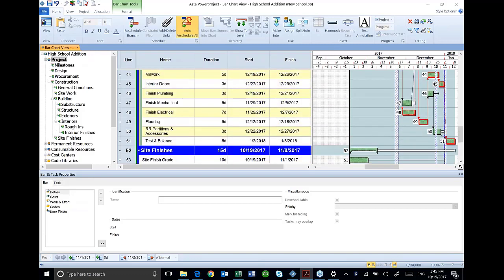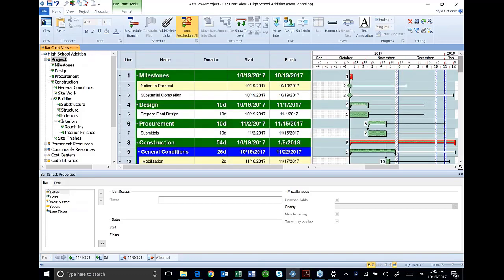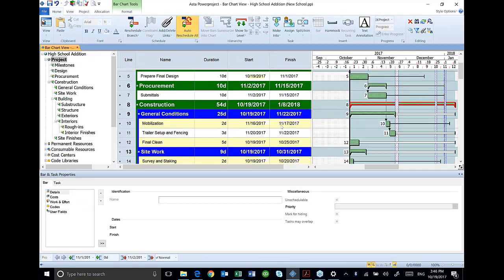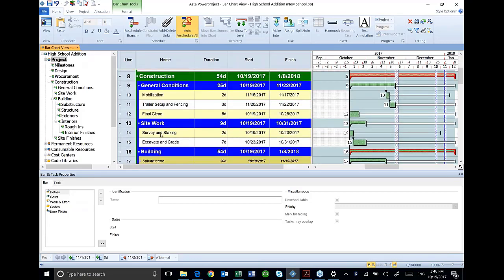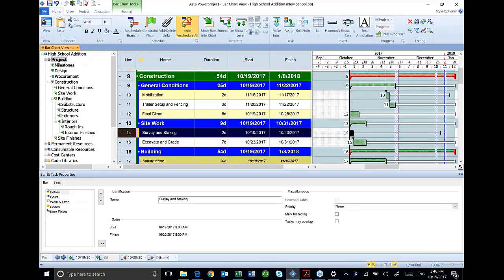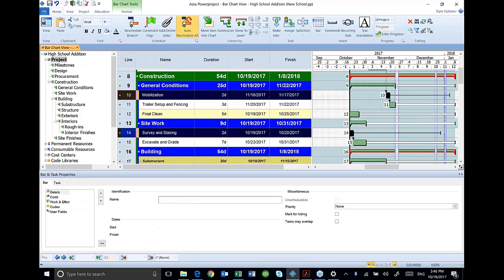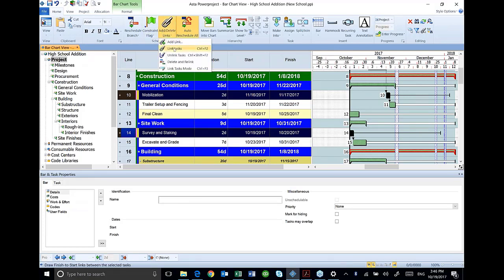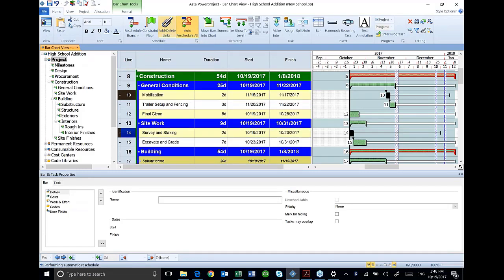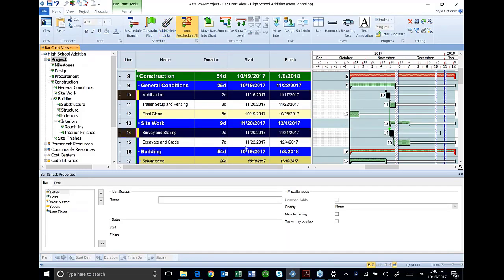What I do now is once I have each one of these groups linked, now I'll go to and link between the groups. For example, I've already got the early ones done, but I'm going to start here with survey and staking. What needs to happen with survey and staking? I want to have my mobilization done, and then I'll start my survey and staking. So I hold my control key, select the two activities and then link task.